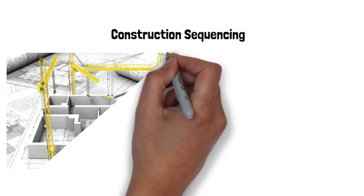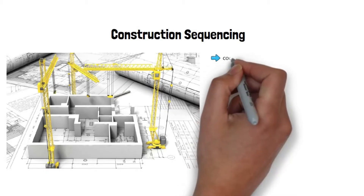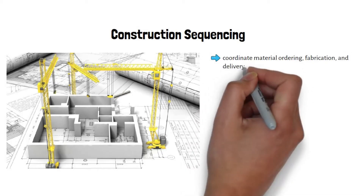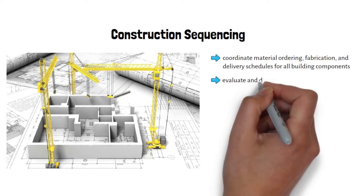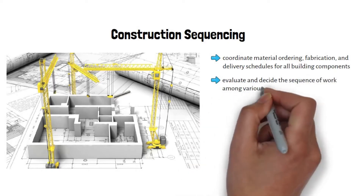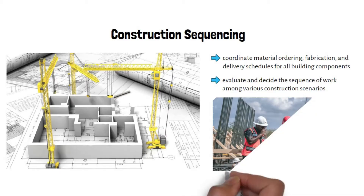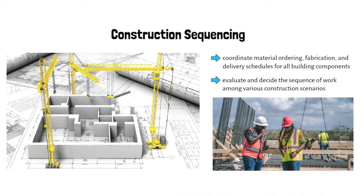Construction Sequencing: Building a structure involves different types of resources, and a lot of time and effort is spent for this purpose. A building information model can be effectively used to coordinate material ordering, fabrication, and delivery schedules for all building components. It gives the opportunity to evaluate and decide the sequence of work among various construction scenarios. BIM simulations also help field teams understand the sequence of works and work accordingly.